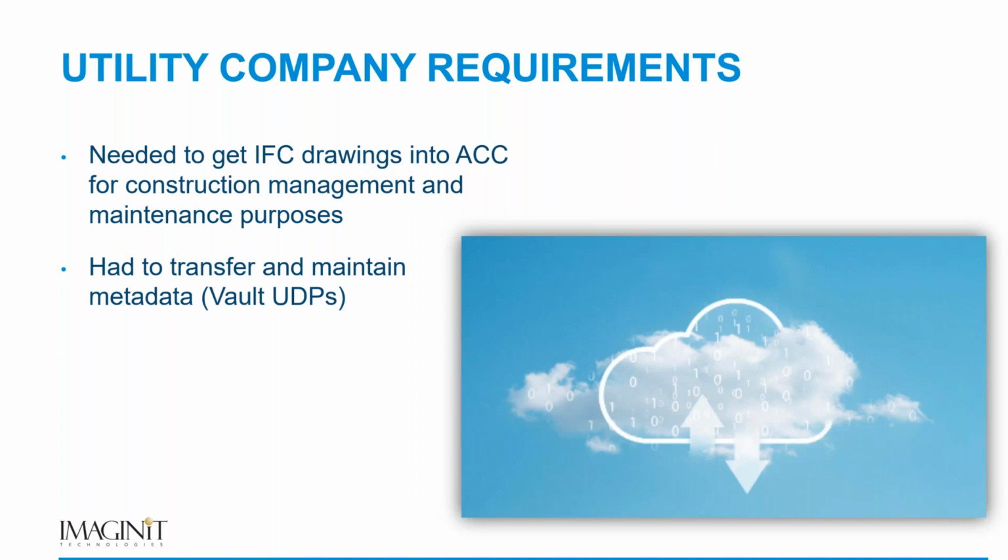And probably the bigger, I won't say challenge, but requirement was there's a lot of metadata about these files inside of Vault that they needed to transfer with that data into the Construction Cloud. This particular firm has over 5,000 substations that they're managing. So having that metadata available for query and search purposes was one of their utmost requirements.